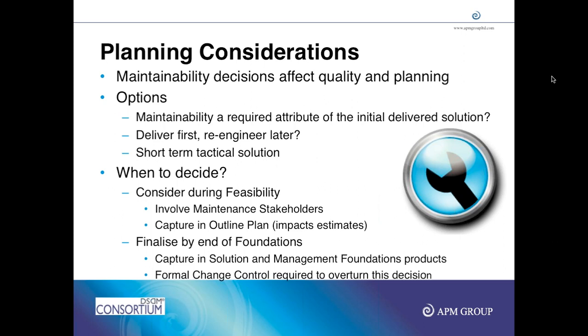That is a very high quality product. Remember, if you are trying to make a very high quality product that does not require much maintenance, then you have to carry out lots of tests and lots of reviews. That may actually delay your first release date. So you have to think about your objective for development and maintenance of the product.